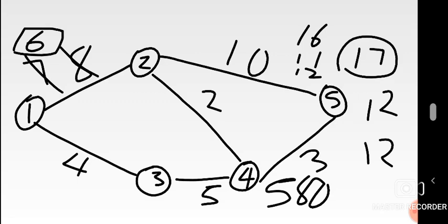And for 1 and 2, it was what? 50. Okay, so you keep adding. The more you crash, the cost goes up. So from when we reached 7 days as the first crash, it gives you a cost of 630. Okay, that's the first one.